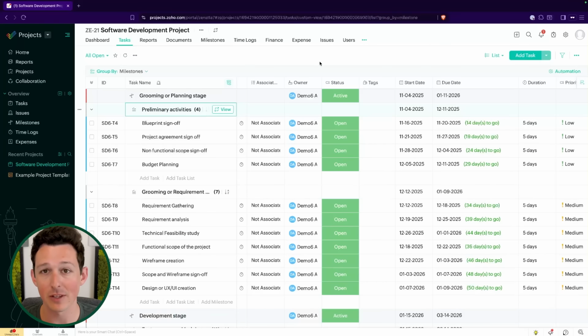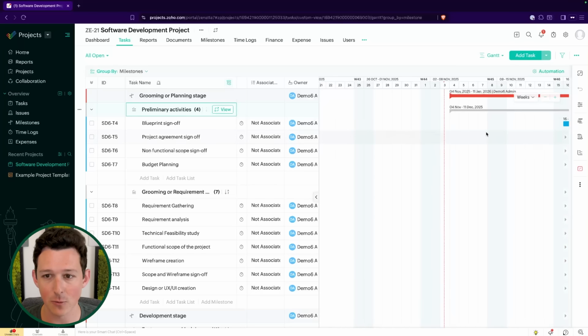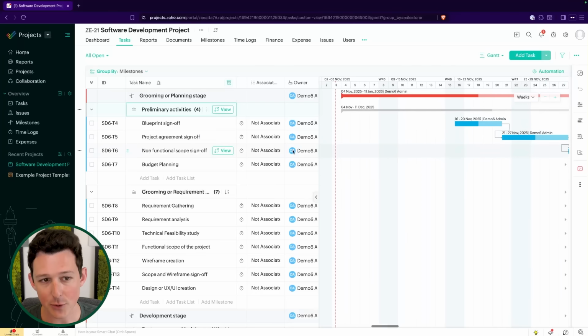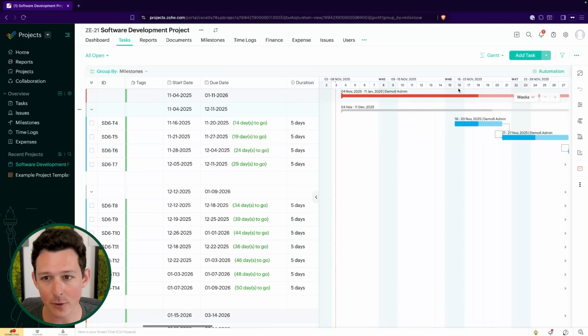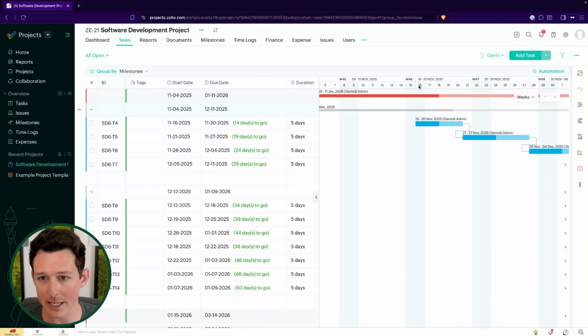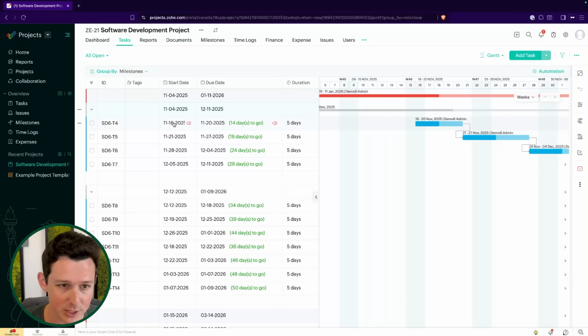While we're talking about the list view where we can see these tasks, I also do want to show there's a few different views that are in play. We can visualize our tasks in what's called a Gantt chart. So this is basically a view that's going to show one of these blue lines for each and every task. And they're going to be plotted into essentially a calendar view, right? So we can see up here, this little column would be like our 16th of November. And the blue line starts there because that's where our start date is set.